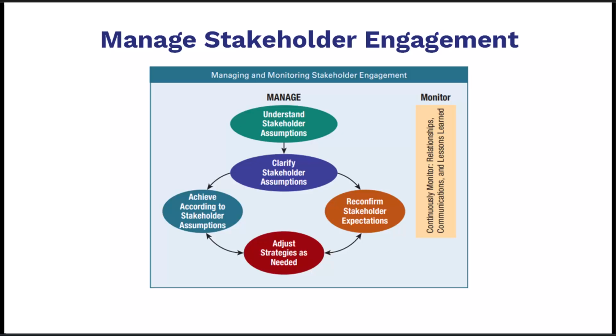Understand assumptions. Patients expect fast access. Clinicians worry about message volume. Privacy officers need strict release rules. Clarify. Fast means within 24 hours. Abnormal results are held for clinician review. Messages are routed to a triage pool.